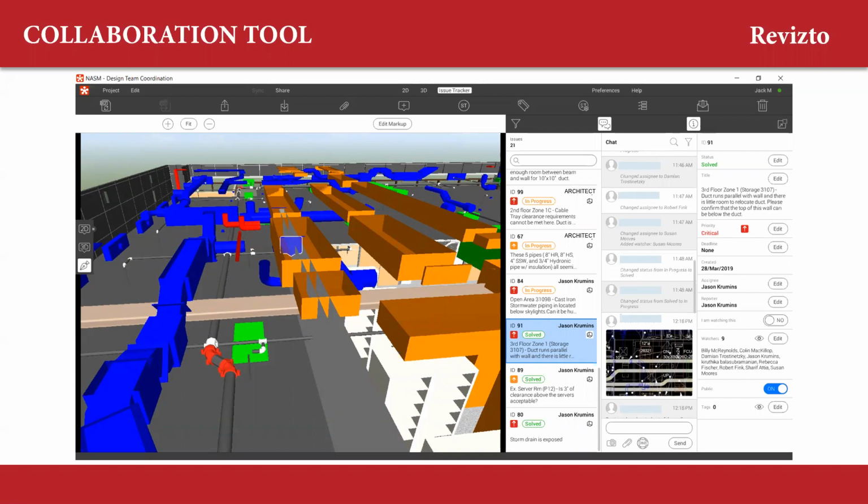But what you would see is a lot of issues that were created and solved in the same day, right? Outside the RFI process. How often does that happen, right? I identify an issue, I submit an RFI, the architect has 10 days to return an answer. Maybe that's the right answer, maybe we need to discuss it more. Imagine that multiplied over a 750,000 square foot building, 6 years of construction. That's a lot of RFIs and a lot of time taken. We are working collaboratively, solving these issues in almost a social kind of context here.